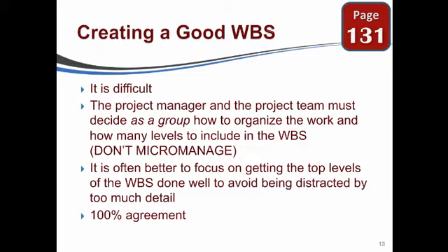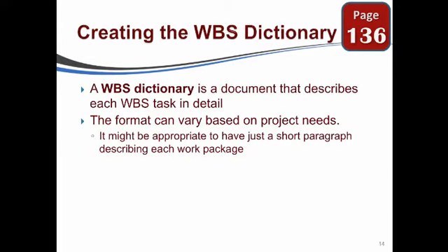One of the things you'll find that really helps you is developing a WBS dictionary. And that's a document that describes how each WBS task is to be done in detail. Once this is done for one project, you'll find yourself drawing upon it as a resource for other projects.